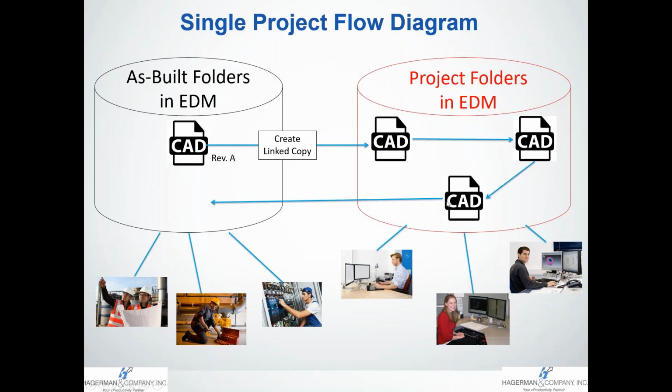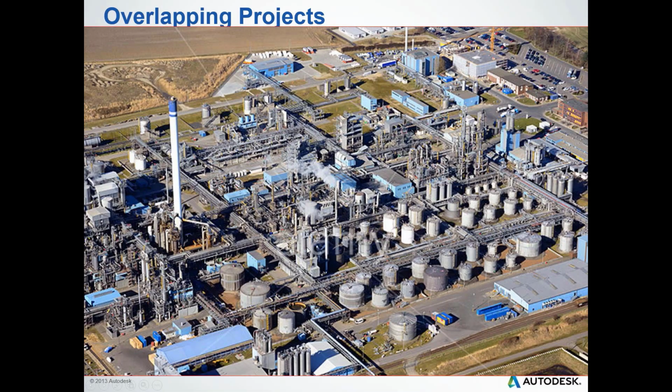And then when a project is complete, the new as-build has been done, be able to select the individual file or the entire batch of files for the project and say update parent copy, and then automatically hand it over, and all of the linked as-built are then updated to Rev B or whatever the next Rev is in a single command.